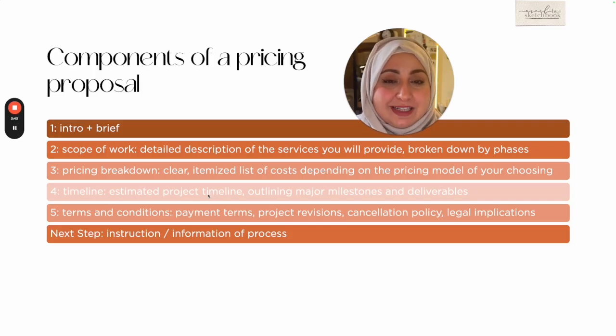So you have to set a time limit. This project cannot exceed the 3-4 months mark, for example. And then after that, there's a different charge, and then there's a different pricing proposal. As long as you have that communicated to the client, then you'll be safe from things that are out of hand.